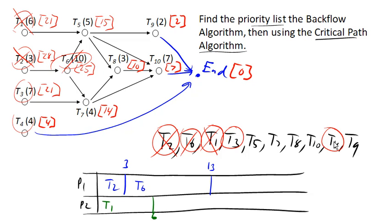so we can go ahead and...oh wait, no, task 3 is ready. Okay, so we can go ahead and assign task 3 here. It's earlier on our priority list. And it has a time of 7, which also takes us out to 13.